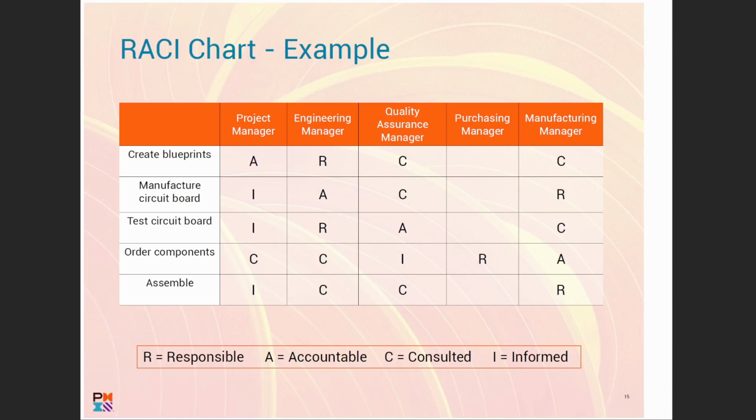So what about the engineering manager? The engineering manager is responsible for creating blueprints and testing the circuit boards, whereas he's accountable for manufacturing of the circuit boards, and he needs to be consulted in the ordering of the components and the assembly.